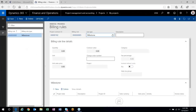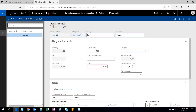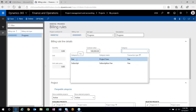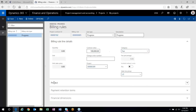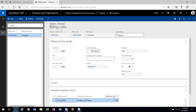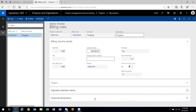I'm going to start by adding a progress billing rule on the project contract. The first fast tab contains the contract value for this billing rule — I'll set it to $100,000 — and then we link it to the project and to a fee category. The payment retention and financial dimensions tabs are standard tabs; you can use customer retention functionality with billing rules to withhold retention from invoices, and you can specify financial dimensions for your billing rules.